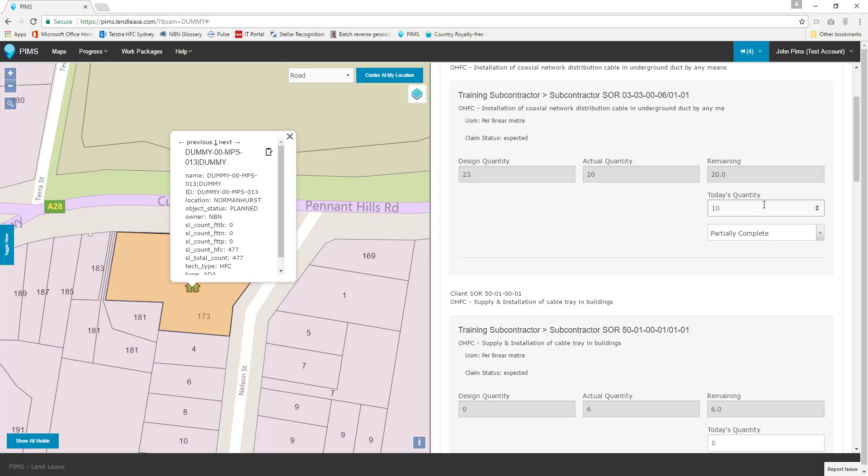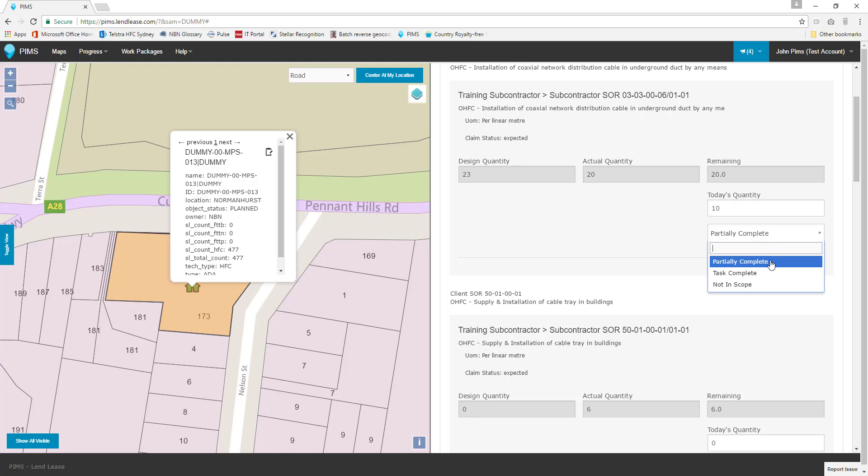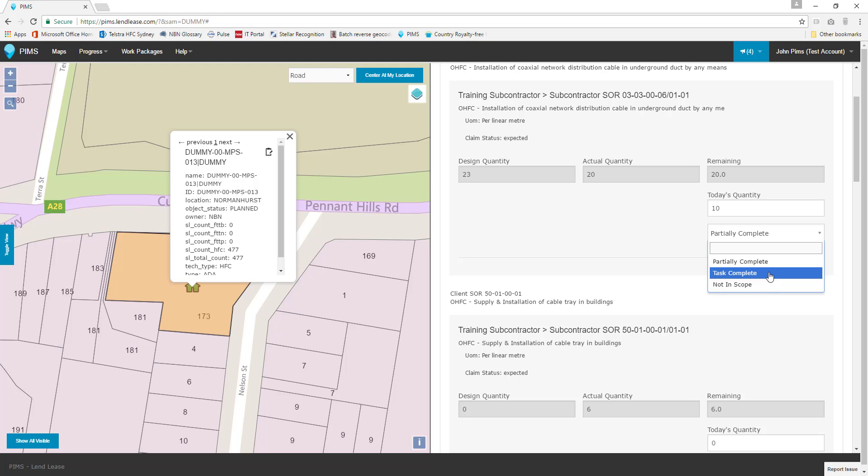The second field available for editing is a drop box allowing us to select from three work statuses: Partially complete, task complete, and not in scope. As 10 meters of cable run remains to be done, let's leave this set to partially complete.